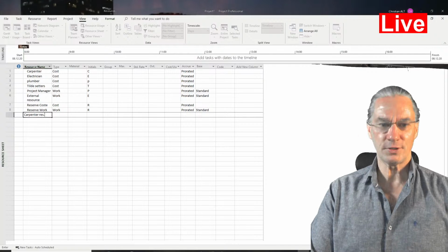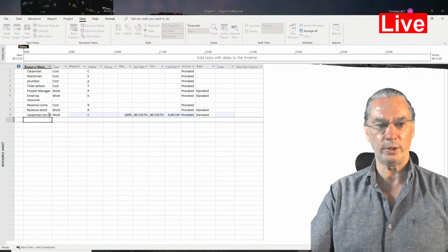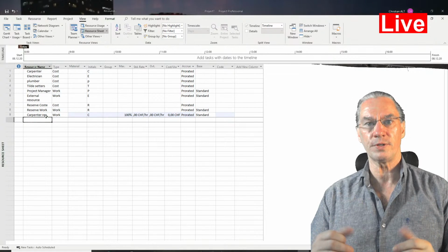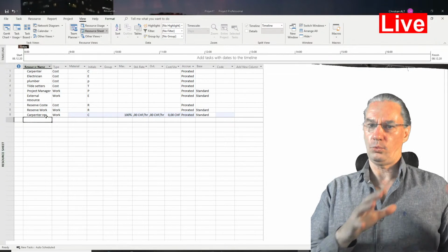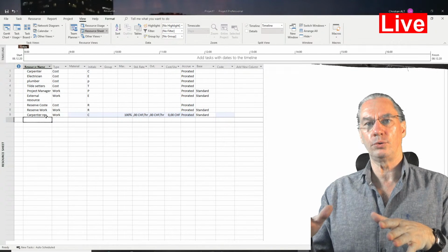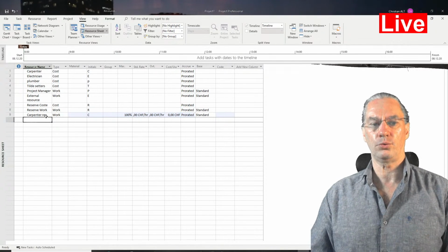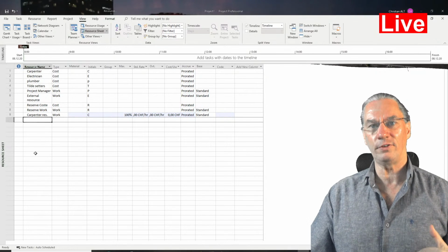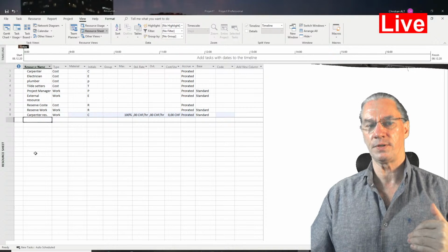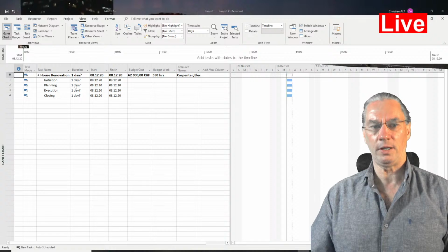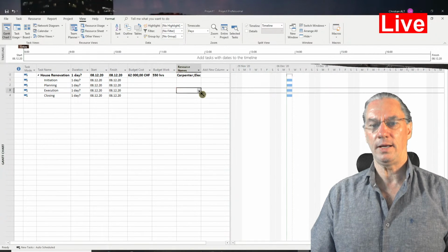So here I have to find another way. I need to define those resources again, because we were in the budget and now we enter into the scheduling of resources. From here on, I need to redefine all the resources, and of course I can apply them and assign them.